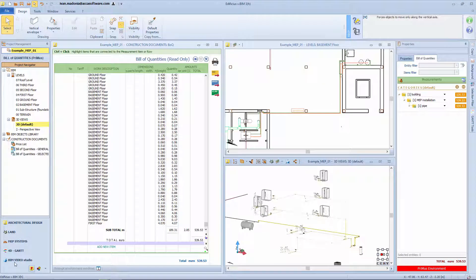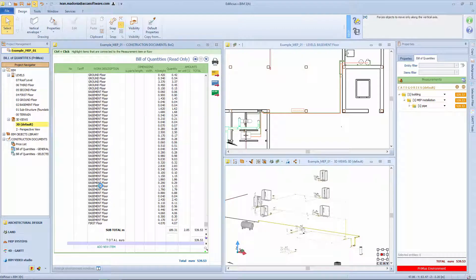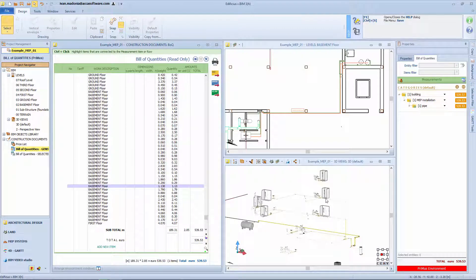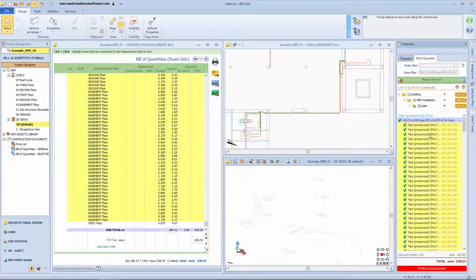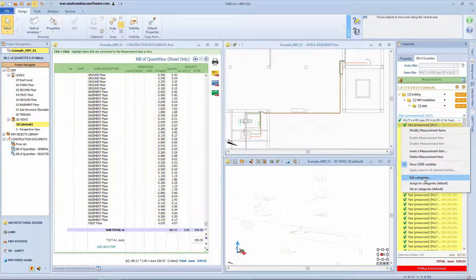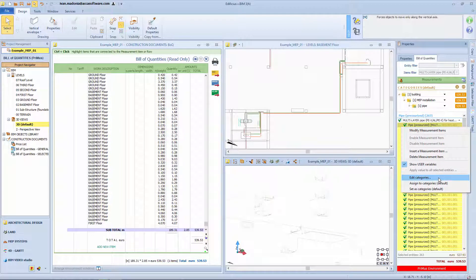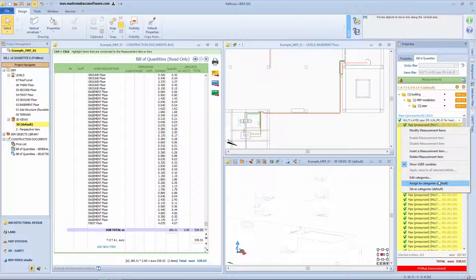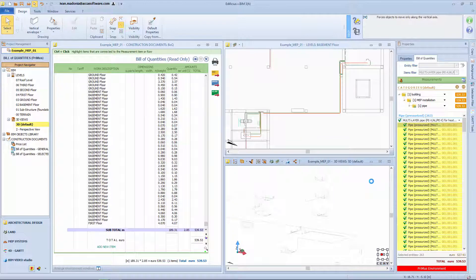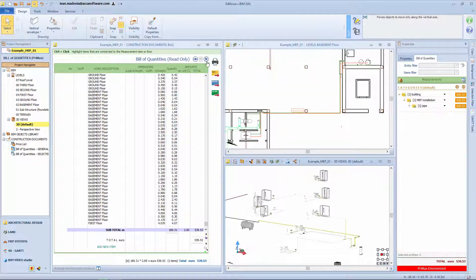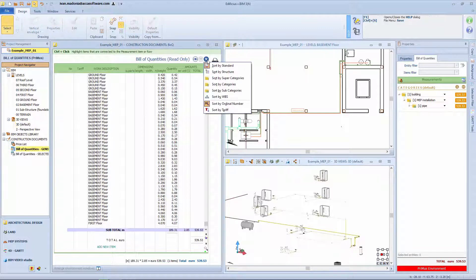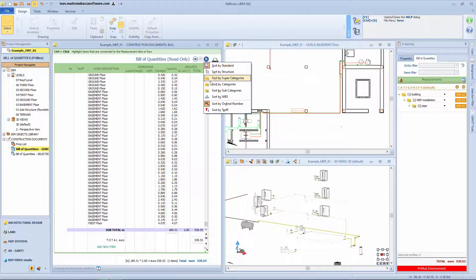Each object can be associated with the categories created and, if necessary, any previously made assignments can be modified at a later time. The Estimate document view can be set according to the categories arrangement and structure with the relating amounts.